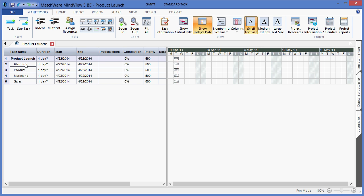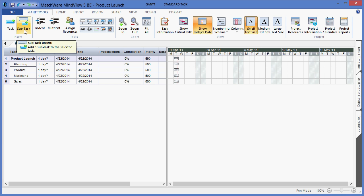To then define the individual tasks that belong to the planning deliverable, I would left click the planning line and choose to create a sub task. In this case we will type setup team.